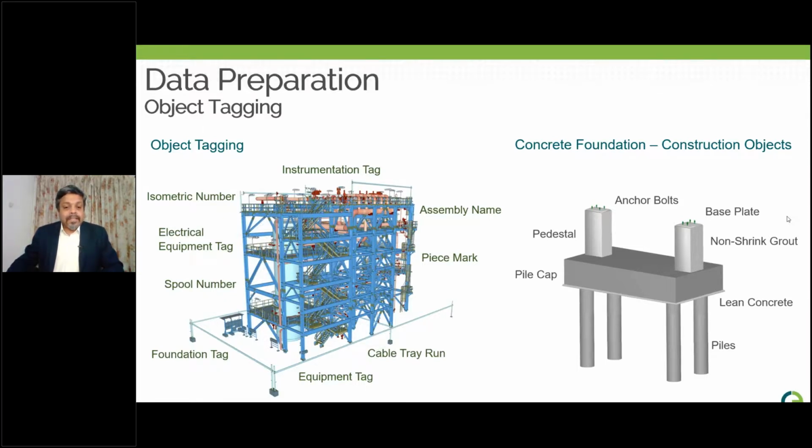To a certain extent, O3 systems support creating construction tags based on the data available in the 3D model. And the created tags will be maintained sustainably. We recommend creating construction tags in the authoring tools because these tags are used not only for the work packaging scope, but also to reference the object throughout the project.